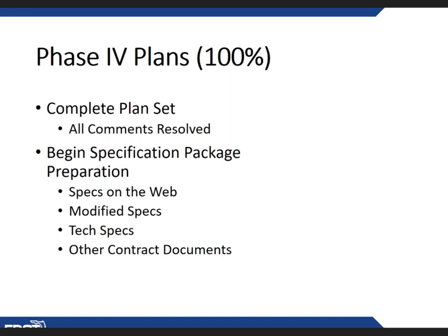At 100% plans, which is that phase 4 submittal, the specification preparation can begin. We cannot begin a specification package on a moving target. So we have to have a complete design. And any specs that have been reviewed or modified, all of these have to be combined into a package. Any of the commitments that have been outstanding on a particular project have to be resolved unless they go over to construction, and construction gets a list of those particular commitments that they would have to fulfill in the construction phase.